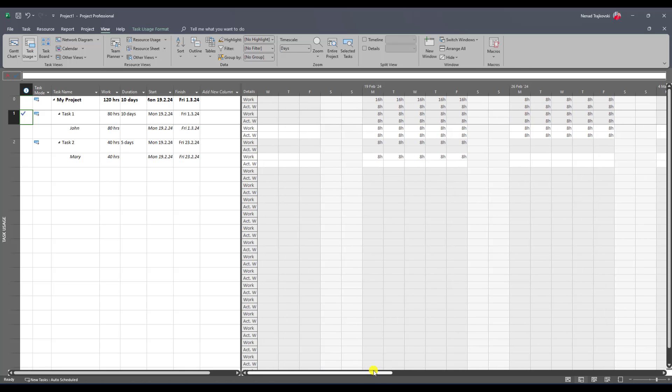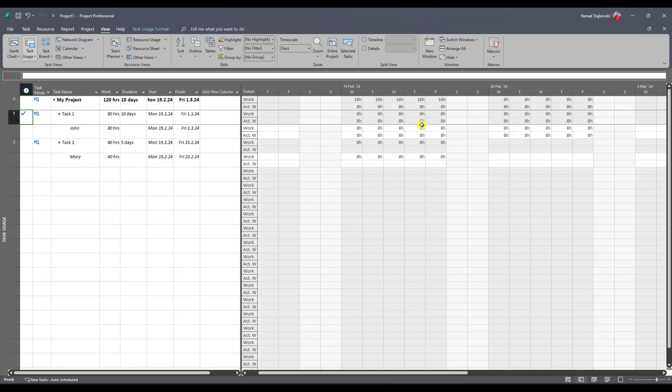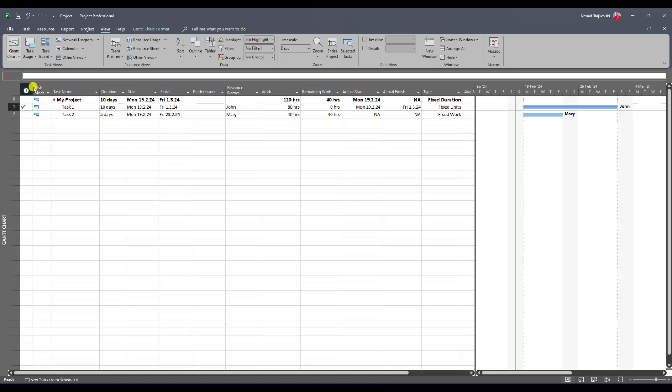So if you want to have fixed work and you want to change actual start and actual finish and you want that work to spread over those actual finish, start to actual finish date, then you should use fixed work task type.